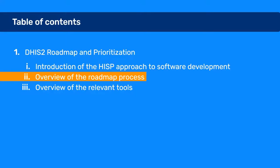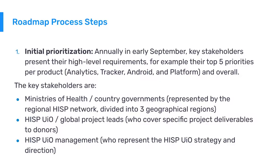We conduct an initial prioritization of requirements annually in early September with key stakeholders who present their high-level requirements — for example, their top five priorities per product. The key stakeholders we seek input from are the ministries of health and country governments represented by the regional HISP network, divided into three geographical regions.